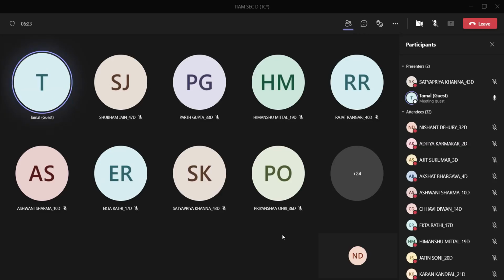Yesterday we have seen that critical path. It is critical because the task on this critical path actually has zero float. That means we do not have the luxury to let this task be delayed. So extra care, extra tracking effort has to be given on this task.